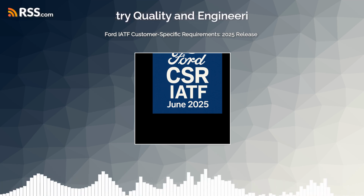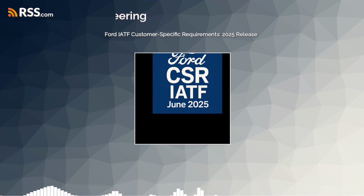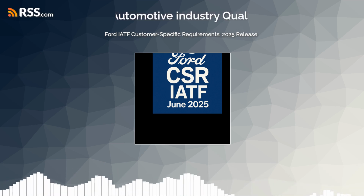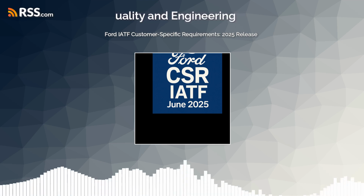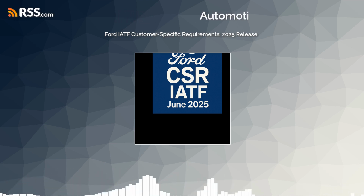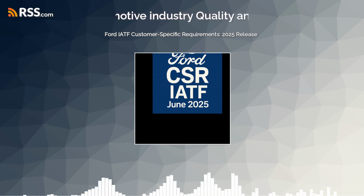These plans are required for parts produced from the earliest production intent stages, from off-tool, off-process, OTOP, or initial trial builds, until the part receives final approval for regular production, OK to buy, or OKTB. They mandate extraordinary controls beyond what would typically be included in the standard production control plan. Extraordinary controls. Oh, yeah. What does that usually involve? Like what kind of things?